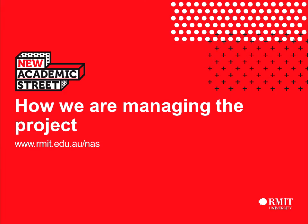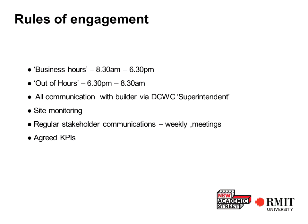So just moving on to how we're going to manage the project. The video talked about the rules of engagement. The rules of engagement is a key document that sits within the builder's contract, and it lays out some fundamentals about how we're going to actually run the construction activity while the works are being carried out in a live environment. So the video talked about obviously noise and vibration and spelled out some key rules.